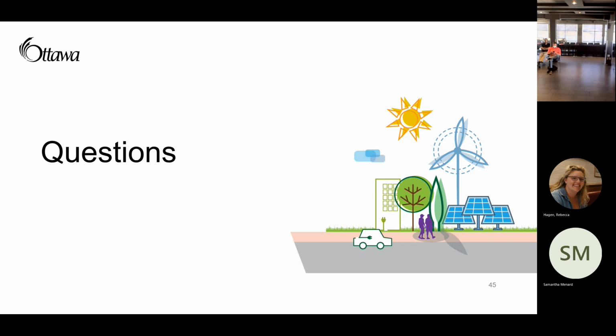What do you mean by after? You can change it as long as you're still meeting the metric. So yes, there is flexibility. But for awareness, what the owner might be a little bit concerned about is that the site plan process is a public process. So if you're saying something, the public knows that, and let's say it's a building that's going for sale, there might be some buyers who are buying into that, and then you have to deal with that communication piece. So that could be a challenge, but we're not holding you to it.